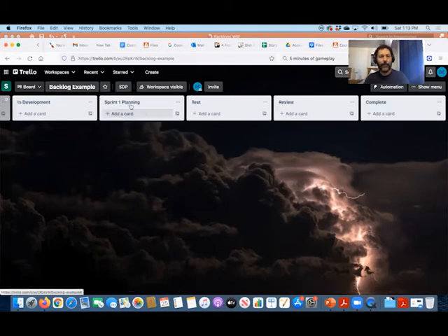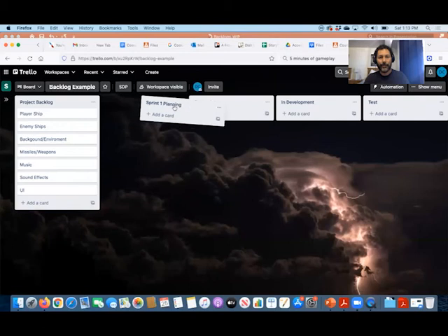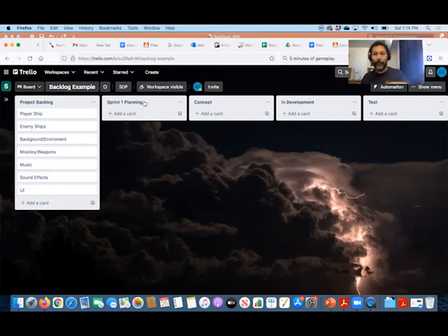I'm going to take it all the way over here because you're going to be doing your sprint. Every 2 weeks, you'll be having a new sprint. And in that, you're going to be taking your highest priority item from your backlog. Now, here's the thing. We have now player ships, right? So that's our epic. Now we're going to go to more detail and things like that. So we have only one player ship. That's fine. That can be its standalone only thing.